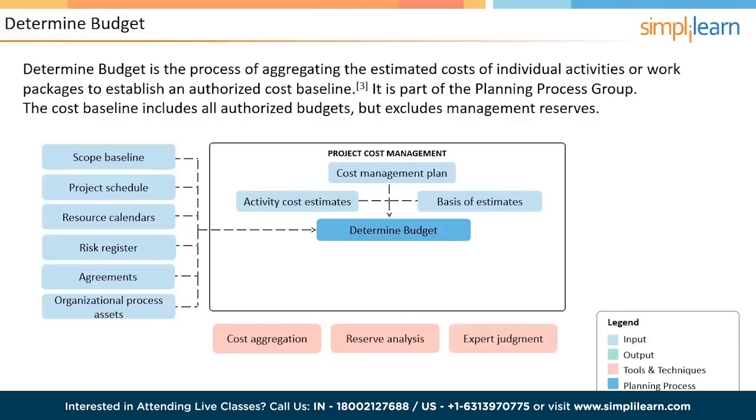Expert judgment is a technique in which an expert's help is sought to estimate the activity cost. An expert is someone who might have worked on a similar project in the past and has a good idea to estimate the activity cost involved. Historical relationships are used to predict the total project cost using a mathematical model. This is similar to the analogous estimate or parametric estimate method.